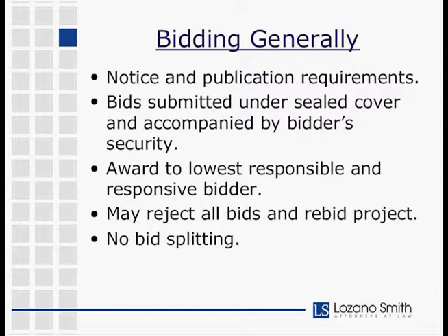There's a possibility there for the district to reject the bid based on a finding of non-responsibility. But in this case, as opposed to responsiveness, there is a due process hearing required. So you don't just notify them, you have to actually give them a hearing.